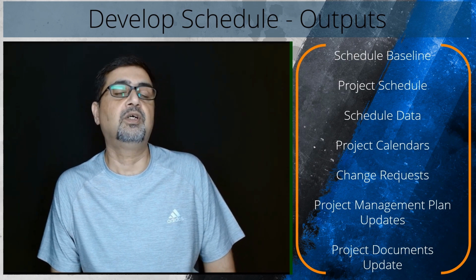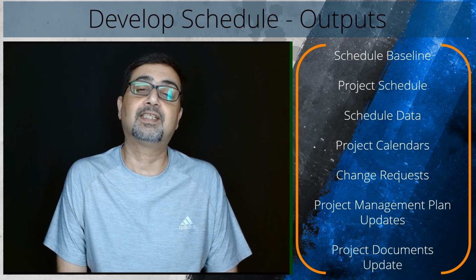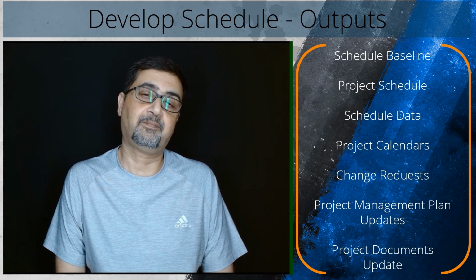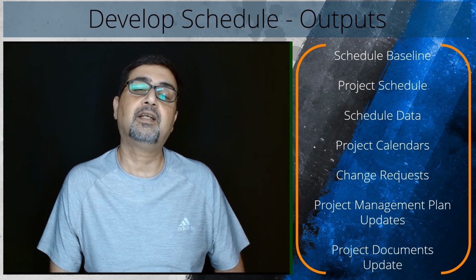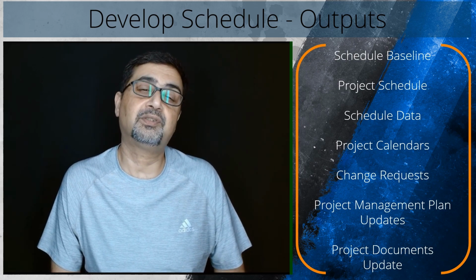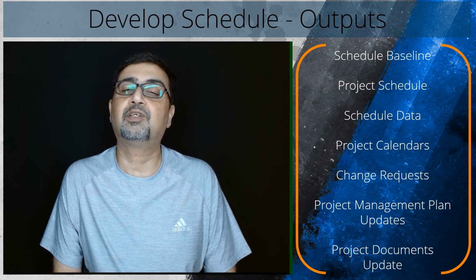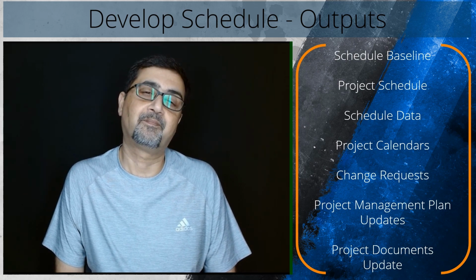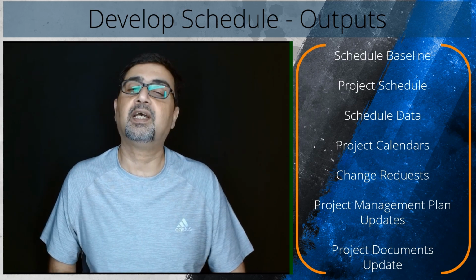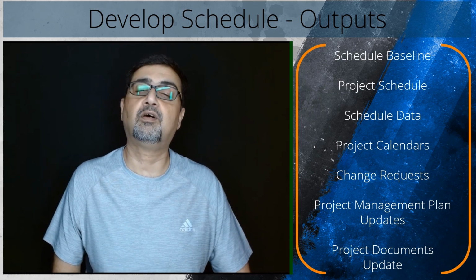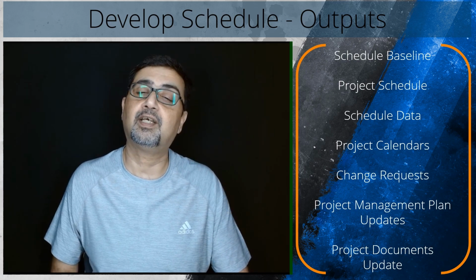Another presentation of the project schedule network diagram is a time-scaled logic diagram. These diagrams include a time scale and bars that represent the duration of activities with the logical relationships. They are optimized to show the relationships between activities where any number of activities may appear on the same line of the diagram in sequence.